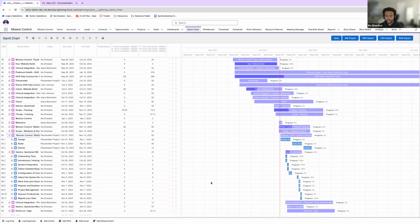So if you have a client, and like we mentioned earlier, if you have multiple projects attached to one program or one master project, maybe you don't want to start implementation before you start configuration. Maybe it's the same thing, I don't know. But you can have two projects assigned to one customer, and you want to say, all right, I don't want to go to the second project until we finish this first project. So we're able to create cross-project dependencies here.